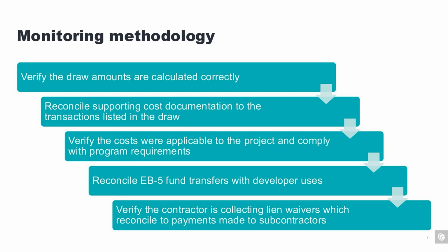Additionally, adjustments from the draft pay application process or pencil draw, incorrect application of formulas, the application of change orders, use of allowances, use of contingency, and recognition of previous payments. All of these things can contribute to pay application errors. Consequently, Baker Tilly begins the draw management process by recalculating all of these invoices.